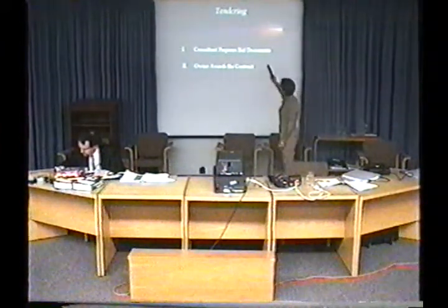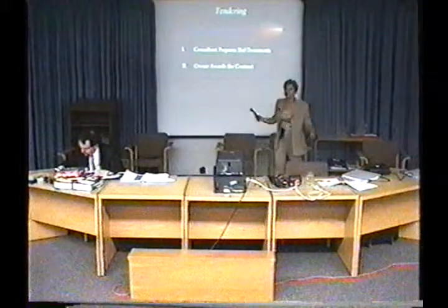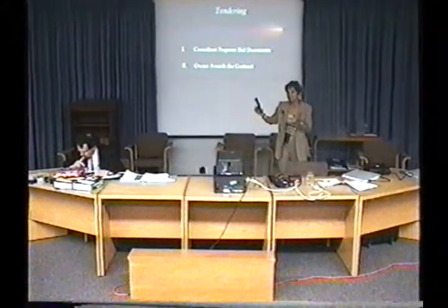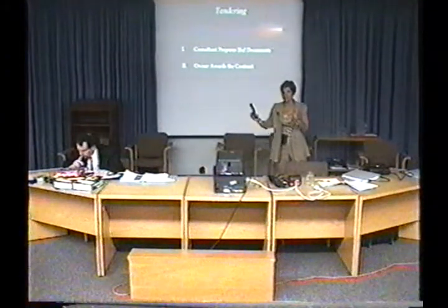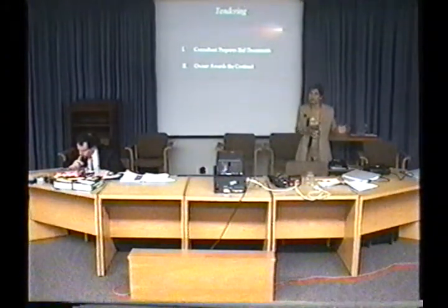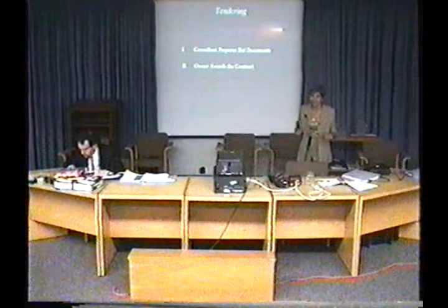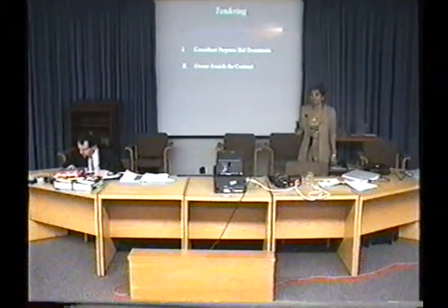One of the common problems within the practice is if the tender papers and documents are not completely prepared or are missing things. That's where the general contractor who's bidding on it looks at it and says, okay, I'm going to make a lot of money on this job because these are the things that are missing, and I can make the extras after I submit my bid.